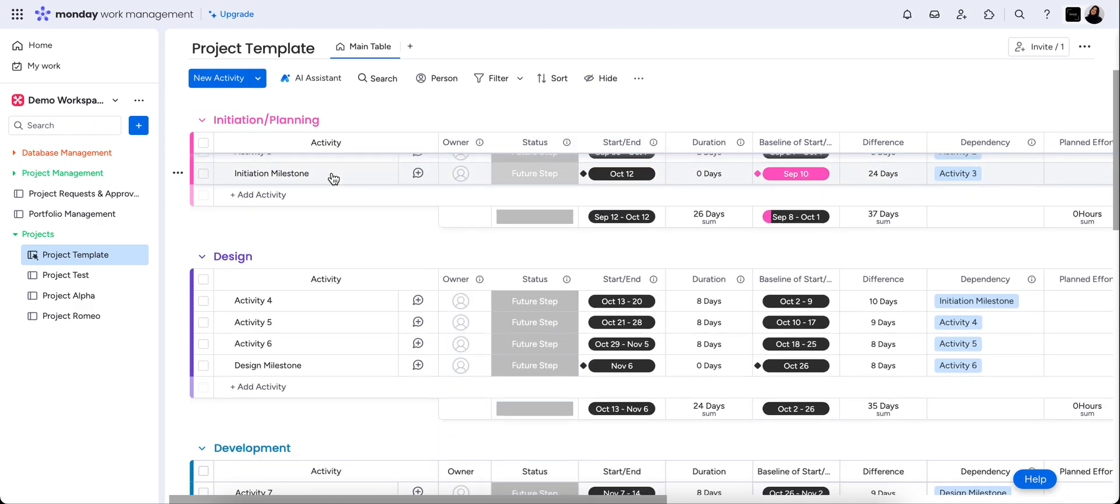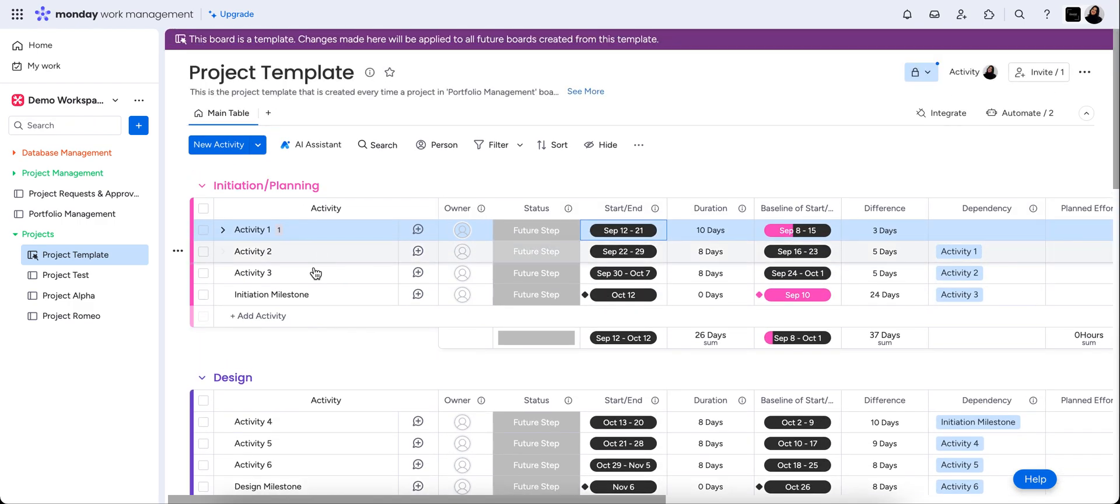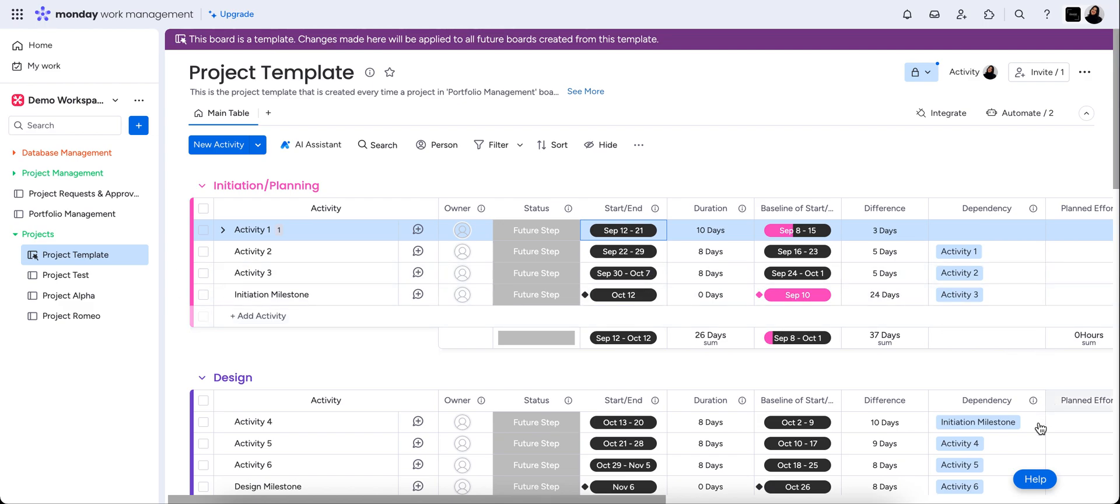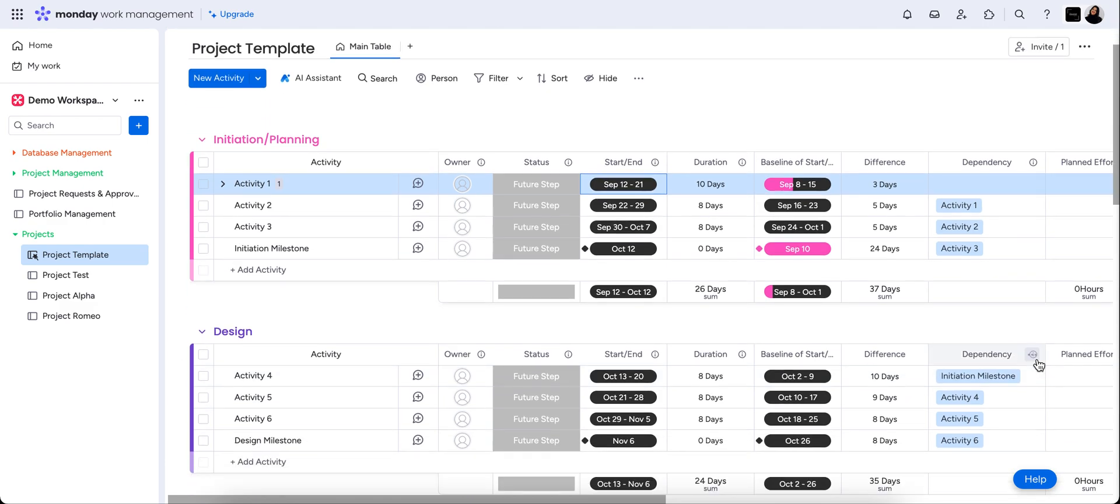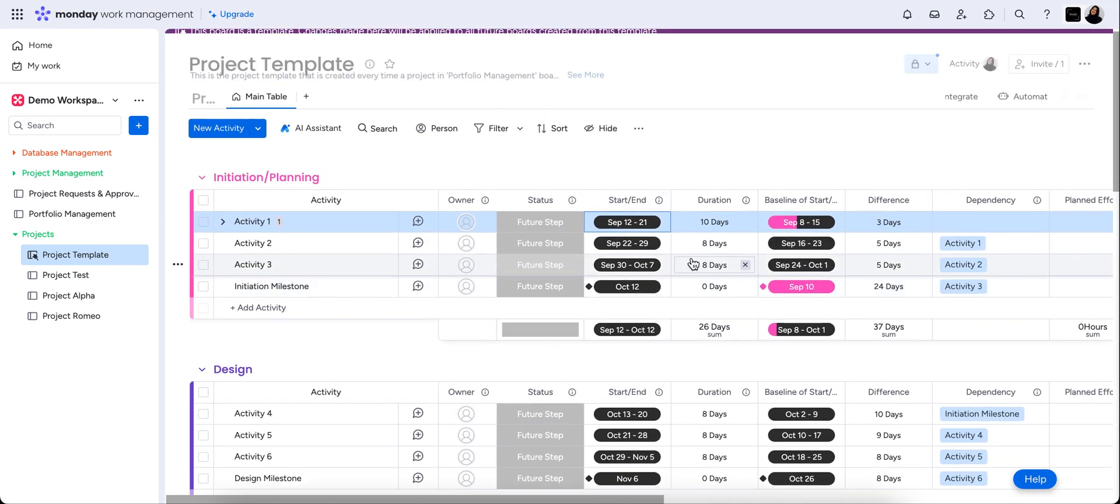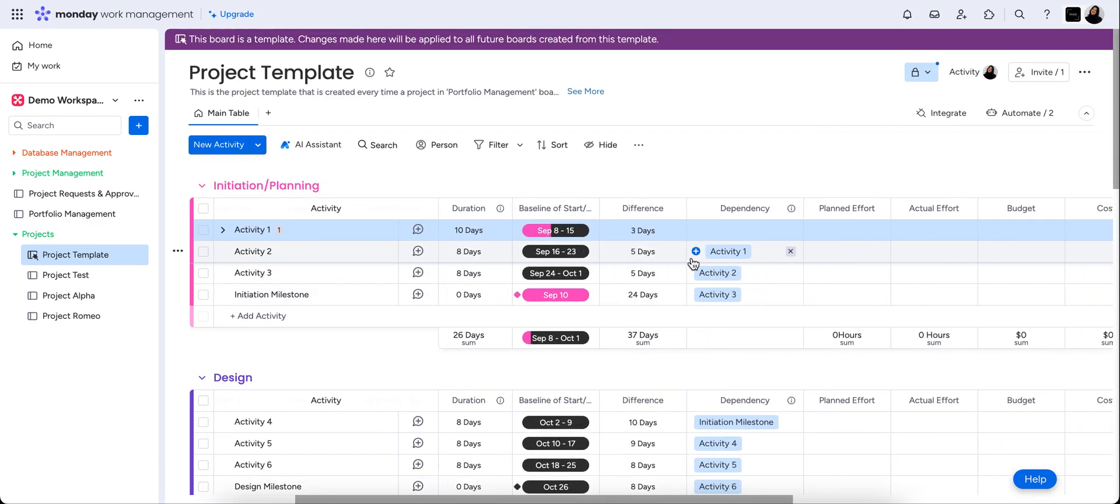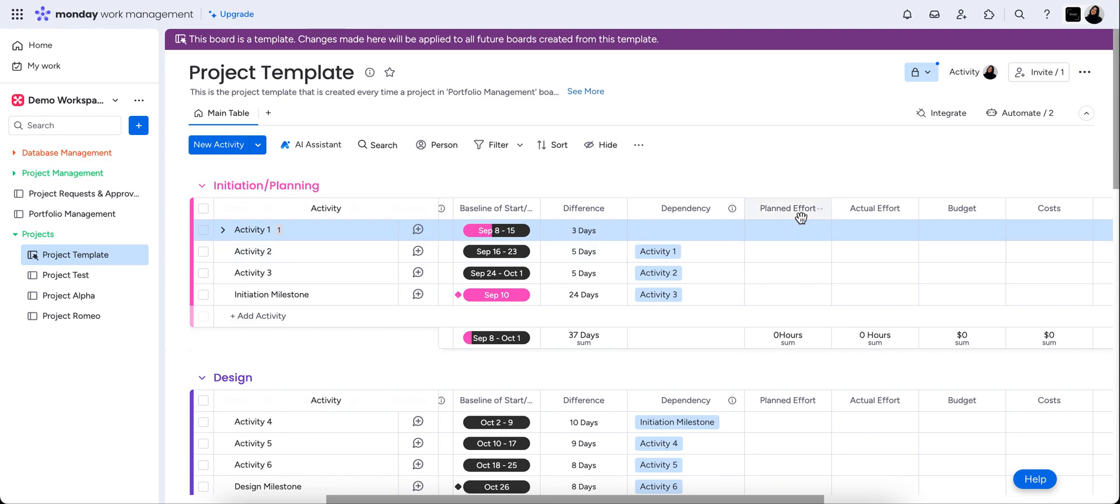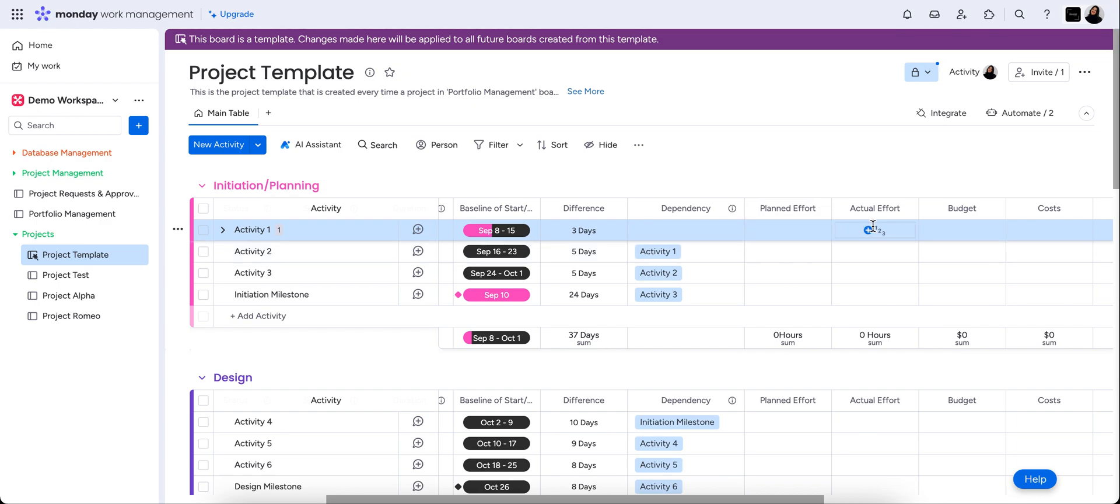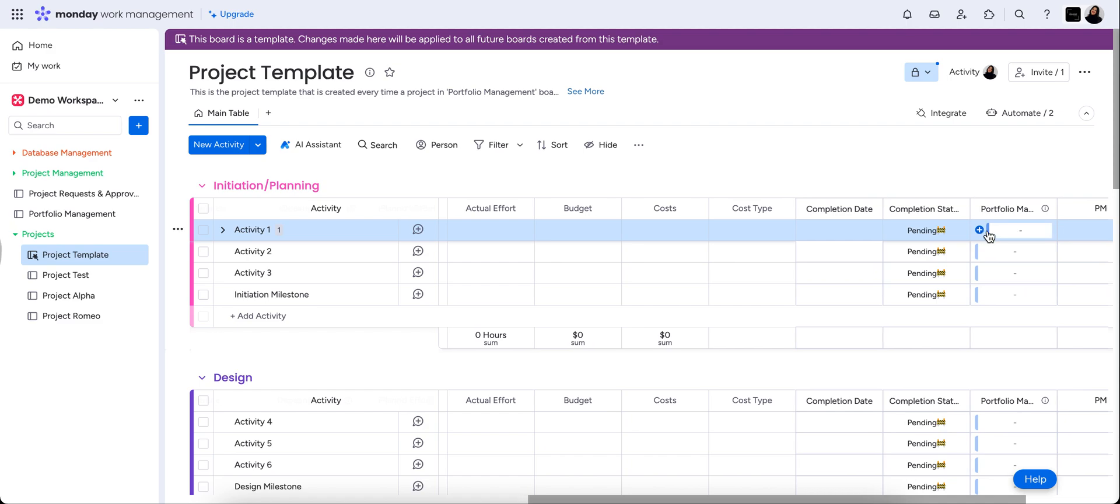So we can see the initiation milestone or the finishing date of the initiation stage is the trigger for the next step, which is design. So it's all dependent on the finishing date of the previous step. Again, we can see here that we've got some more information here per step and it's all in there.